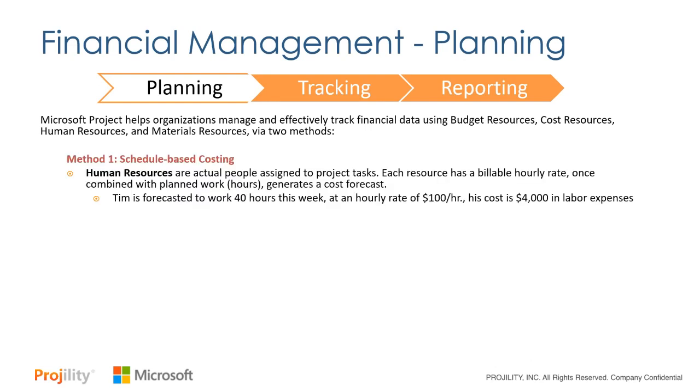The first of those is what we call schedule-based costing, and this is where we're actually going to use the Microsoft Project core schedule to drive a lot of our cost forecasts. There are different kinds of resources we're going to be leveraging across our different schedules. The first of those are human resources, which are actual people. We're going to attribute a certain hourly rate to these people, assign them to certain work, and then Project is going to help us roll up that cost from the bottom up.